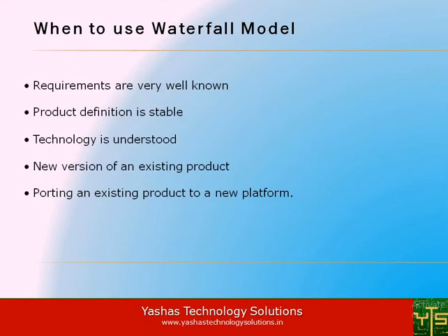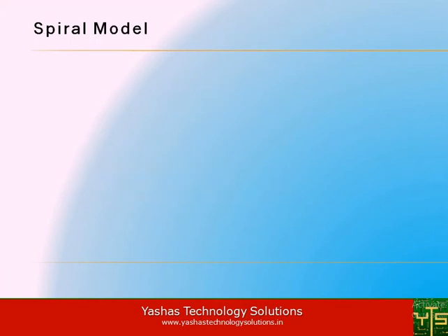Waterfall model could be better used when requirements are well known, product definition is stable, technology is understood, new version of an existing product, porting an existing product to a new platform.